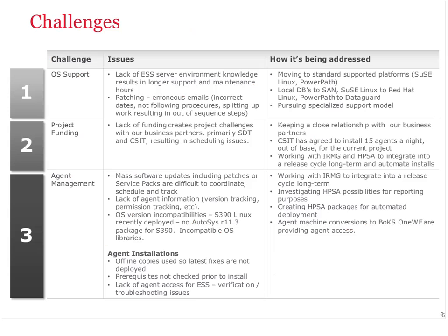Again, speaking of the big company, we're a big company. Some of the challenges we've addressed is not owning the clients. So the job queue, we have a rolling pool of SAs who actually do the installs, and they may be encountering AutoSys the first time today and then installing another product tomorrow. So because of our lead times in generating requests for these installs and funding, and we have to make sure licenses are paid for, there's often a month to 2 month lead time before an agent is installed.